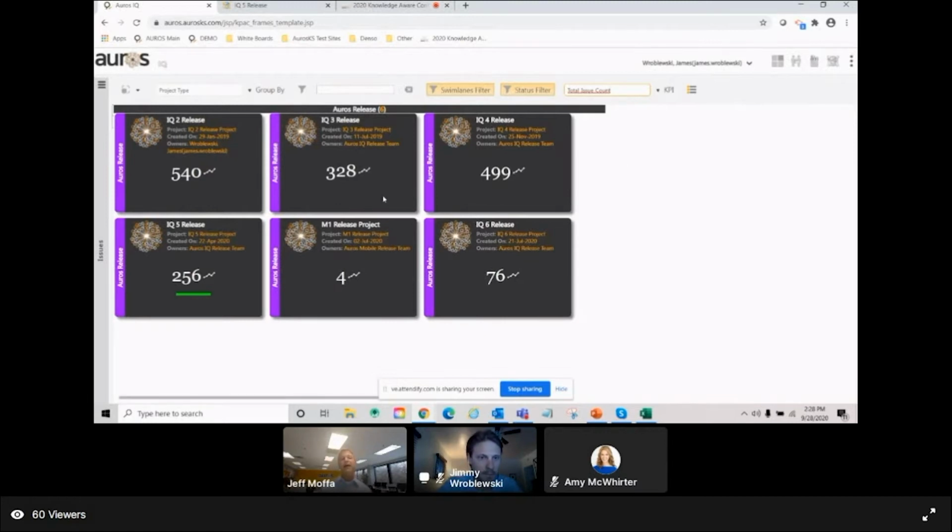So there's a KPI that gets trended for the total issues. Basically, these are units of work in terms of issues. They could be defects, enhancements, lots of different things, but they're units of work that are going to be coded into a release. And you can see that the KPI is placed onto the card summary view, so you can see that across the projects. You can click on the little trend icon and see the trend over time. And the green bar tells us that the KPI is currently in a green state. So summary view across projects, you pick the KPI, you can see them.